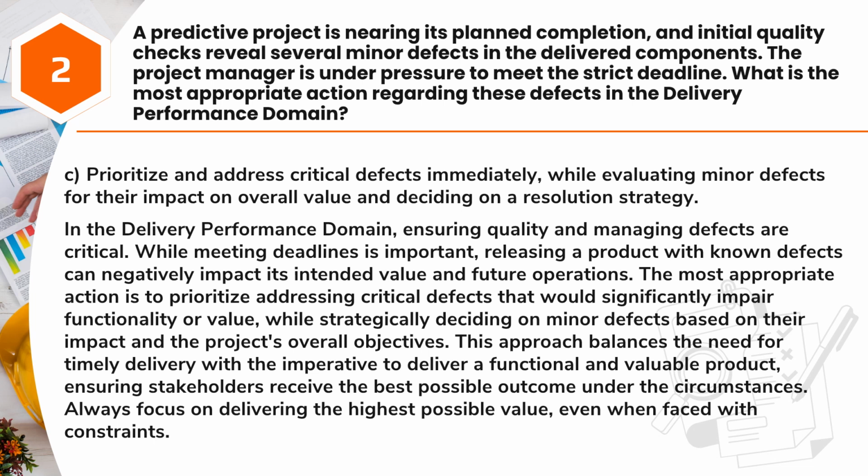While meeting deadlines is important, releasing a product with known defects can negatively impact its intended value and future operations. The most appropriate action is to prioritize addressing critical defects that would significantly impair functionality or value, while strategically deciding on minor defects based on their impact and the project's overall objectives. This approach balances the need for timely delivery with the imperative to deliver a functional and valuable product, ensuring stakeholders receive the best possible outcome under the circumstances. Always focus on delivering the highest possible value, even when faced with constraints.